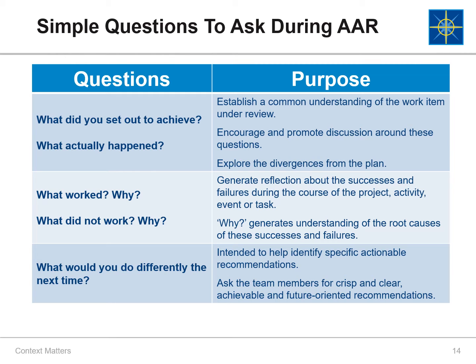And what did not work for you and why? These questions explore the divergence of what was supposed to happen and what really happened. They generate reflection about the root cause of the successes and failures during the course of the project.